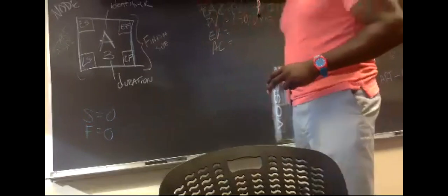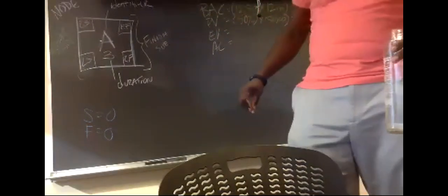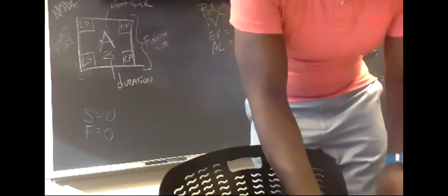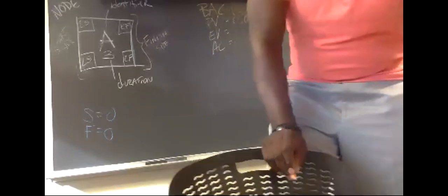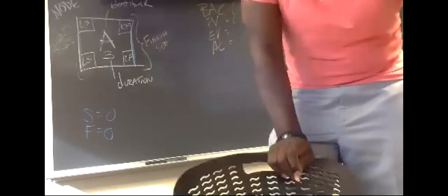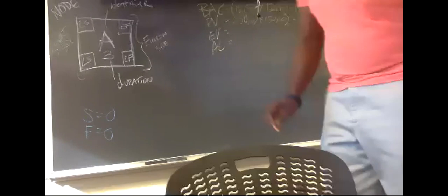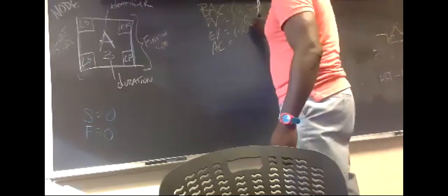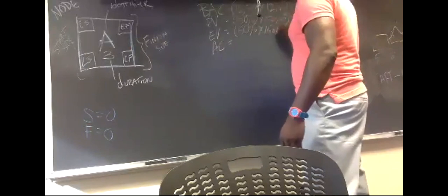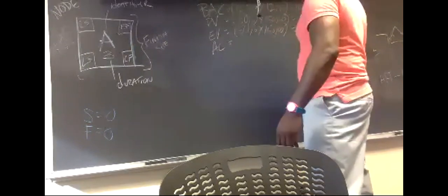All right. Now let's go down to EV, our earned value. Our earned value formula says it is the actual percent complete times the BAC. So if we're 50%, 6 of 12, then wouldn't it be 50% times the 150 again? All right, 50% times 150 equals another 75K.